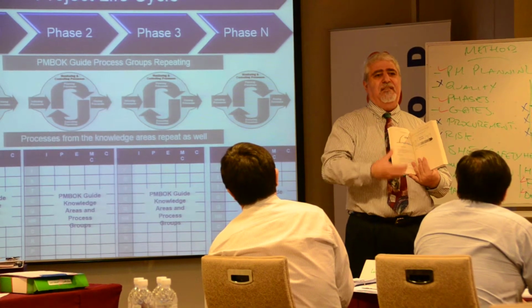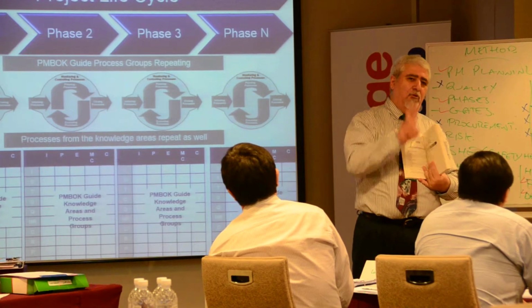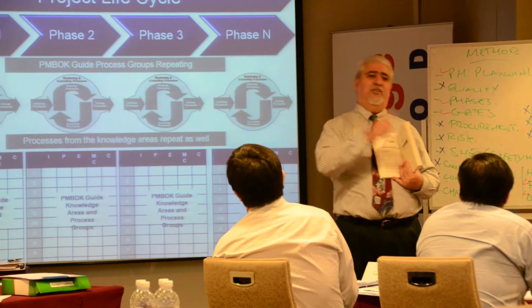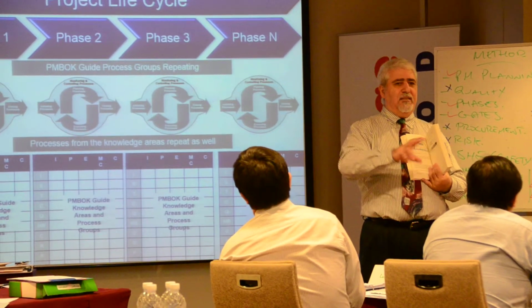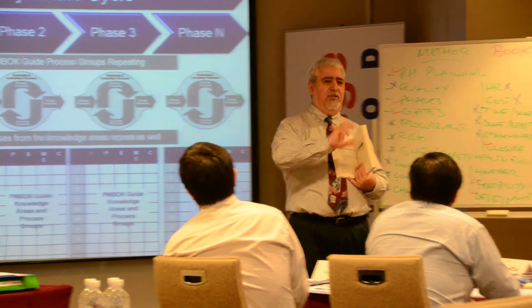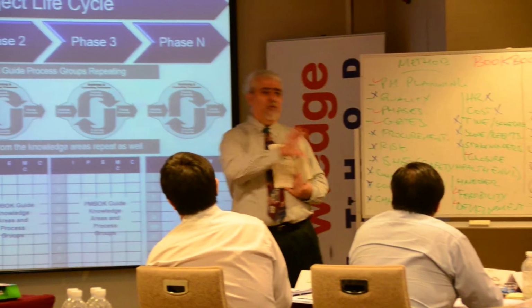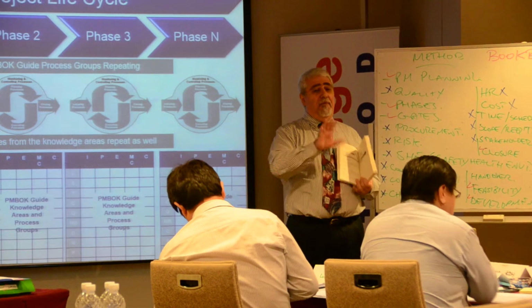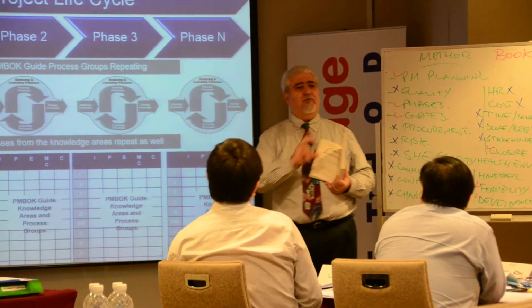So yes, in every phase you must plan, and not only plan, but make two plans. I talk about the stage management plan and the stage detail plan. This is an area where the PMBOK also has issues. This is actually what I'm doing right now: I'm writing a book about the PMBOK. The PMBOK has a lot of good stuff in it, but it has some confusing parts.